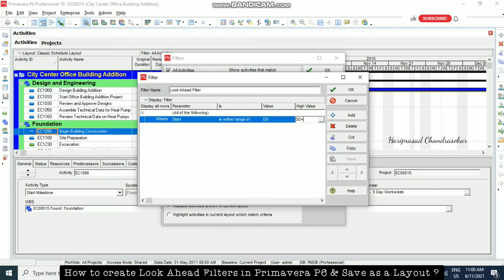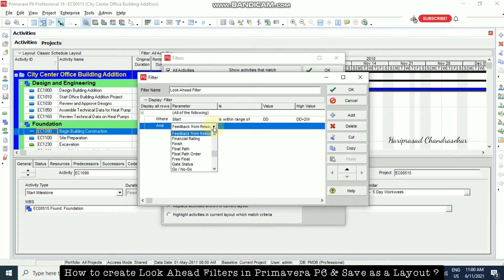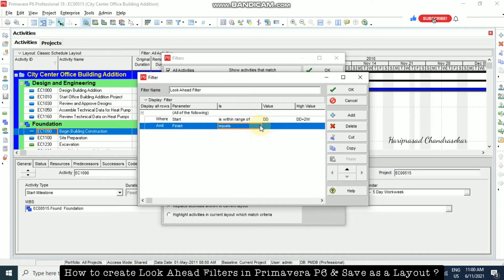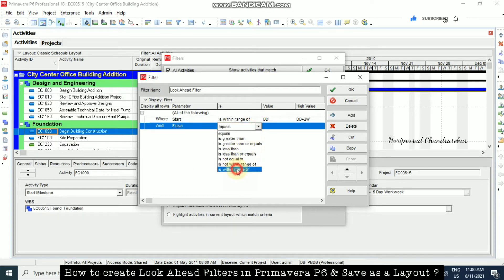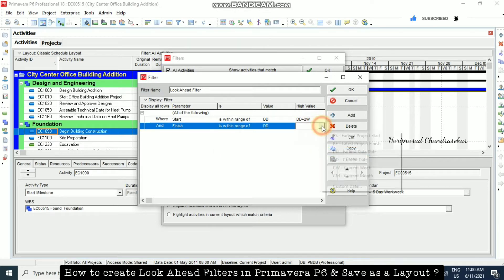If you want a two-month look-ahead filter, you need to put 2m. I'm going to put a two-week value. Then I'm adding a plus condition, now going for Finish, and also selecting 'is within the range of'. Same as before, we select DD and then DD plus 2w.